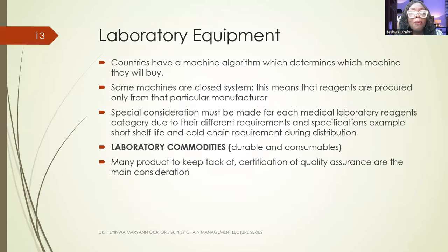Client and government directed acquisition refers to a situation wherein the client or government identifies a supplier by name and in writing, by the USAID contracting officer, Ministry of Health Minister or ambassador, with a reason for the direction, as the source for goods and services.